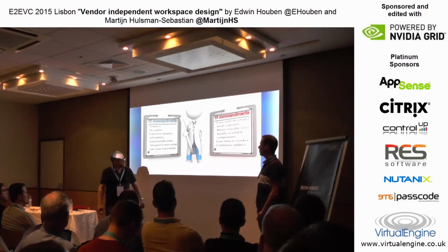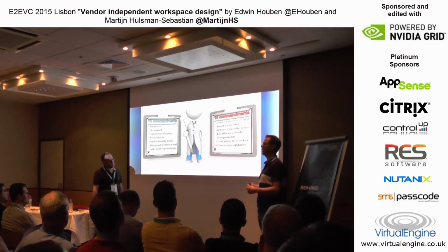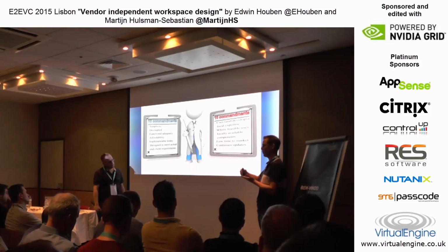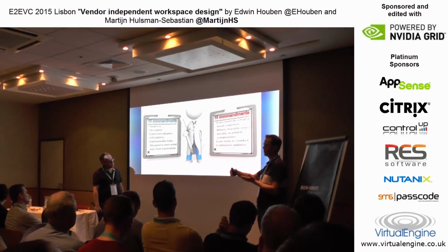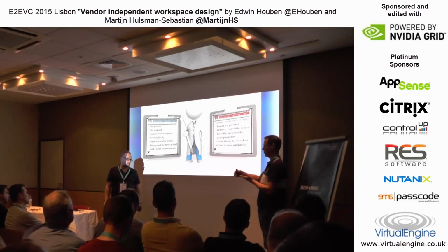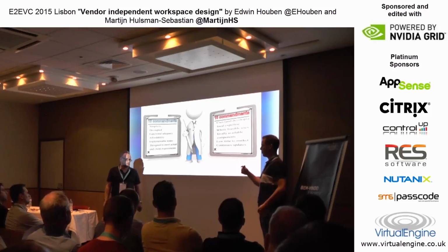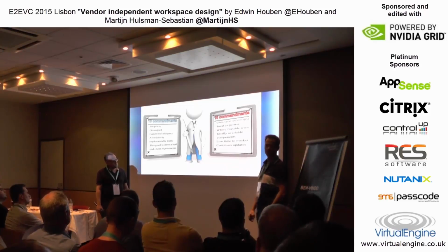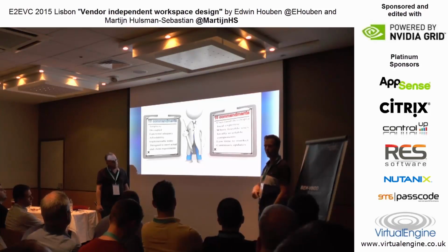Next one, low time to market. What we mean by that is short development cycles: make a base platform and then deliver that to the end user for testing, see if it's all right, and then go to the next functional set. Because you get the customer involved and you get feedback a lot faster than if you go for the end result and then start testing.